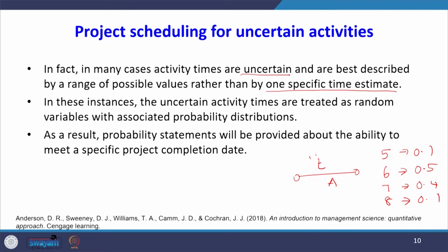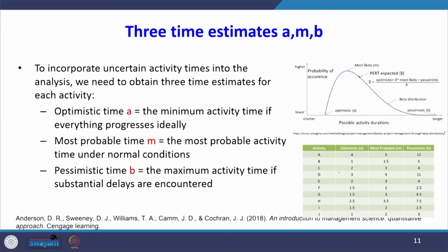Now we discuss the three time estimates for an activity — A, M, B. To incorporate uncertain activity times, we need three time estimates for each activity. The first is optimistic time A: the minimum activity time if everything progresses ideally, with no interruption. The second is most probable time M: the most probable activity time under normal conditions.